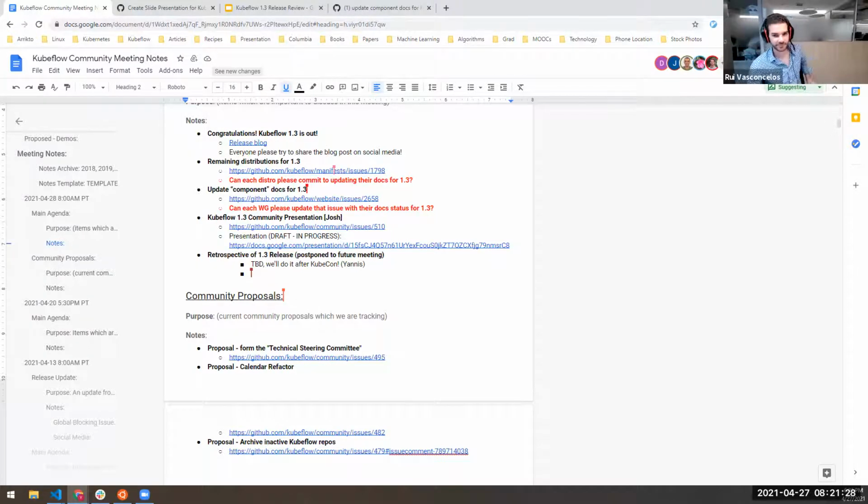Yeah, exactly. And I'll say this at the retro: I strongly believe that the next release team, not an individual, should have a goal of delivering, as a deliverable, at least a first draft of a release guide that will take everything into account that we learned from the last one. Things like ensuring the release managers and the right owners files, ensuring that there's enough people in the documentation owners files, all that kind of stuff. And at least have that as a draft so that for 1.4, we at least don't make the same mistakes that we made in 1.3. And then every cycle, whoever the release team is, their job is just to upgrade that handbook. That's how the Kubernetes one started out, really small. And now it's this huge, long process.